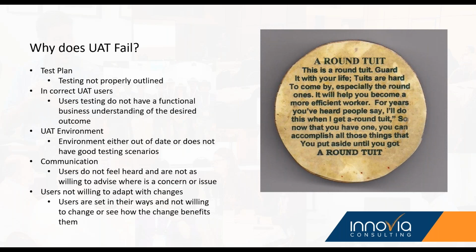And we've probably all lived through working with those users if we ourselves weren't one of those users. UAT environments. Do we have a good environment? Oftentimes we don't just throw stuff into a production database and say, go for it. We set up some testing. Does that database have the correct objects installed or extensions? Have we configured our processes correctly? Do we have sales orders, setups? All the different pieces that ultimately play into creating our test environment to replicate what we are trying to accomplish.